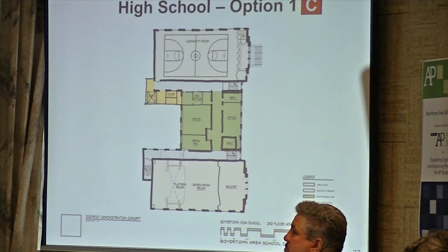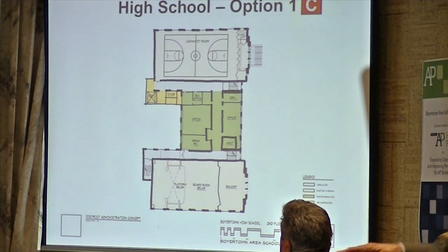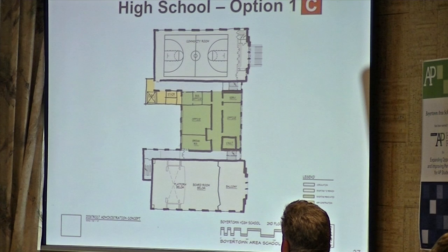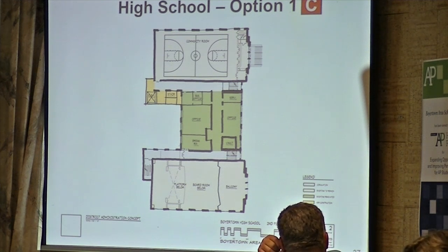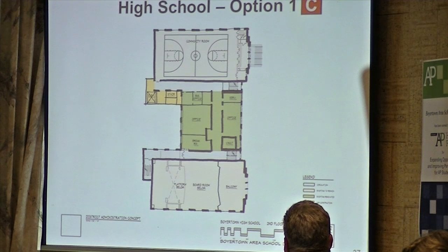Okay. Again, just trying to think out of the box. And keep in mind that, in order to compare, we don't want somebody saying, well, we're not comparing apples to apples. We're looking at the high school being a full renovation, so we looked at this being a full renovation. As a board, you can say, well, we don't have to go to the full $6 million, we could pick and choose. But we did a full renovation in our numbers just so that we're comparing the same things. So what I'm hearing you say is, worst case scenario, if we did everything, it was $6 million. Yes.